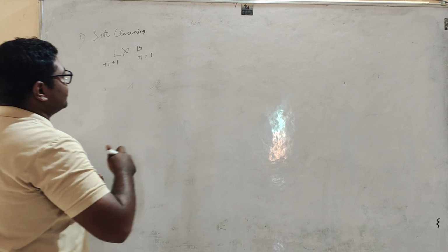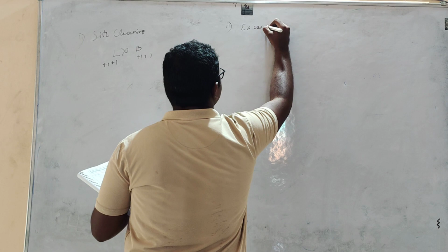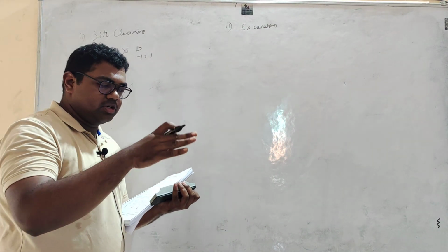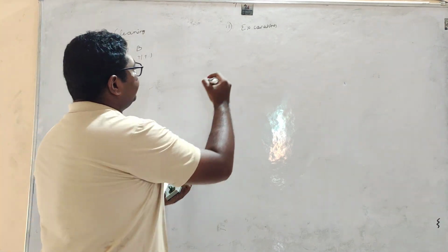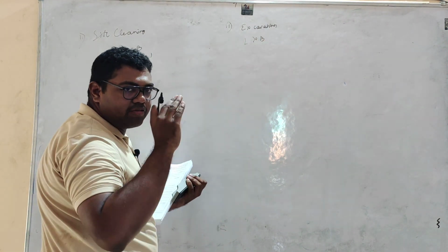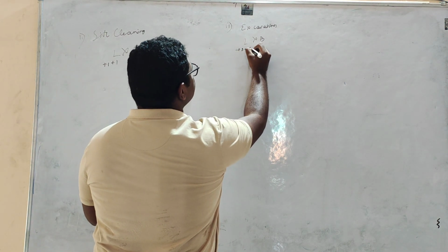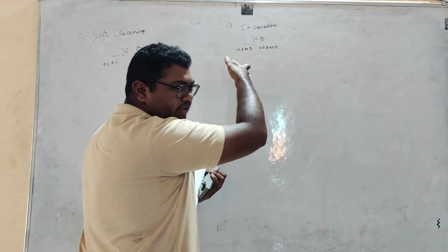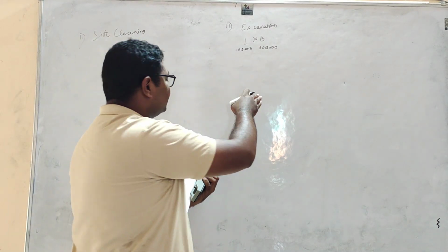Next process is excavation. This involves excavating the column layout area we had previously marked, and for its area calculation, before calculating its area, we have to add 0.3 meters on each side for the labor to get down and work there.